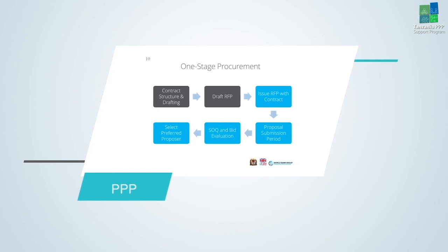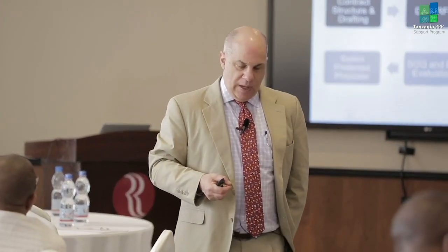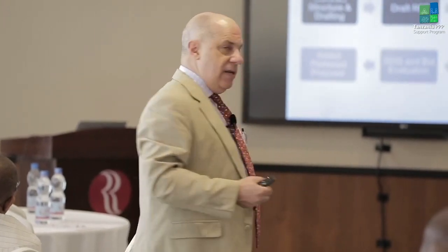These are for projects that tend to be much simpler, fairly common, where you already know the participants. The participants are fairly familiar with it themselves. Again, basically the step you're skipping is you're not going to have a request for qualifications.